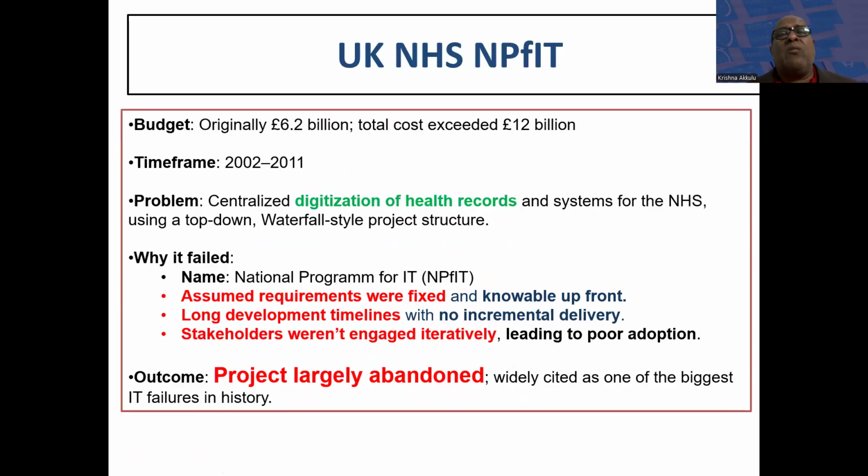And let us say the UK government wanted to build a national program for IT called NPfIT. They wanted to digitize the health records. But these people assumed that whatever knowledge they had was enough for the project. And see how much money they spent. They spent 6.2 billion. The time duration was 2000 to 2011, almost 9 years, and because the time increased, the cost also increased.